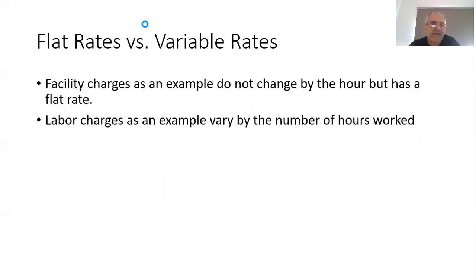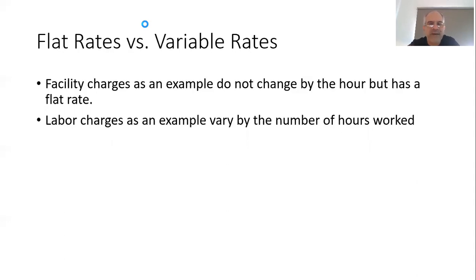We also have to take into consideration the idea of rates. We could have variable rates and flat rates. Flat rates would be, for example, facility charges — the cost of using a building. You make a contract with somebody and whether you do any work or you don't, that building is expensed at a certain rate that does not change. You could take the monthly rent and divide it by 30 to get the per-day rate, and it remains flat whether you use it or not.